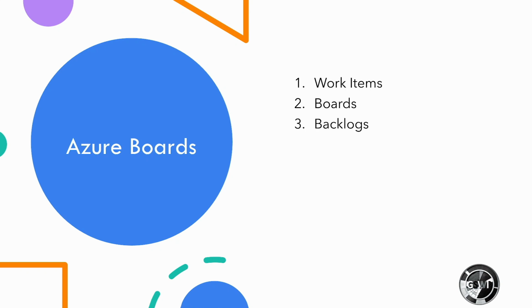Backlogs. In backlogs, we can view, plan, order, and organize work items, including using a product backlog to represent your project plan and a portfolio backlog to group work under features and epics. Sprints. You can access your team's filtered view of work items based on a specific sprint or iteration path. Assign work to a sprint using drag and drop from the backlog. Iterate with the backlog list or card-based task board to implement Scrum practices.